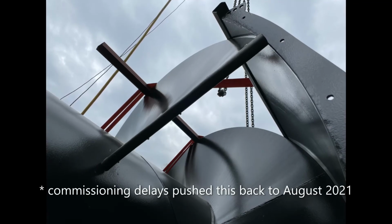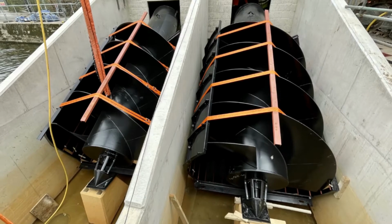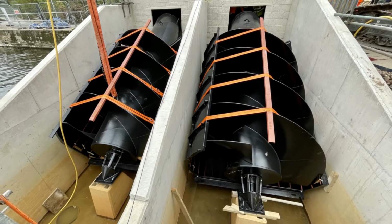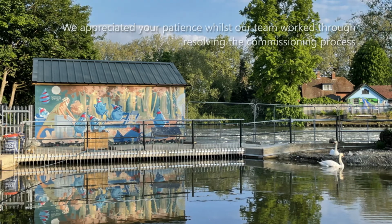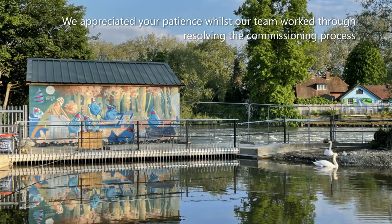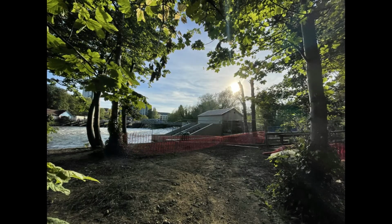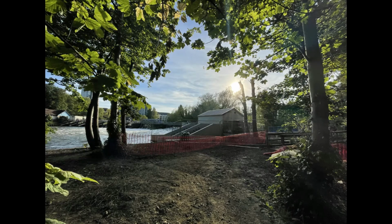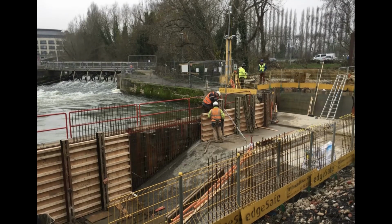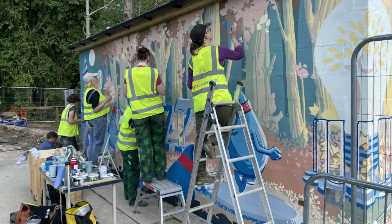Okay, and when will it all be plugged in? So when is it all going to sort of be finally sorted out? Well, yeah, about the first week in June. Oh, right, okay. Yeah, we're doing this sort of commissioning during May, and it'll be producing zero carbon electricity by June. But it's a whole length of project. It's probably taken 6 years, but the construction phase really started in about June of last year. So it's basically about a year it's taken.